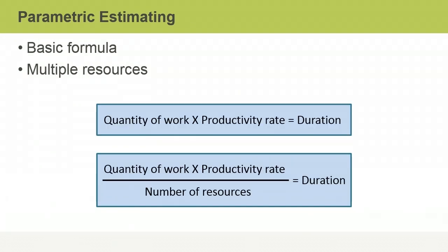Parametric estimating uses a mathematical formula that takes into account various factors that affect duration. Consider the basic formula for parametric estimating. When a single human resource is carrying out the activity, you multiply the quantity of work by the productivity rate. If you have multiple resources assigned to an activity, you multiply the quantity of work by the productivity rate and then divide the result by the number of resources.